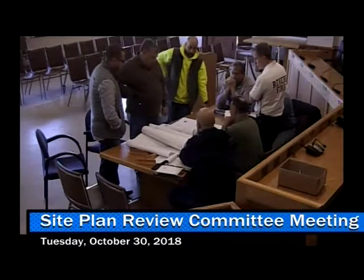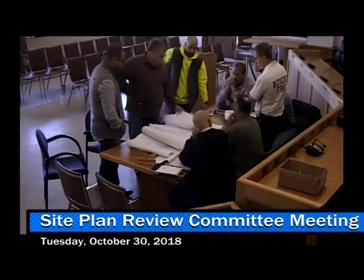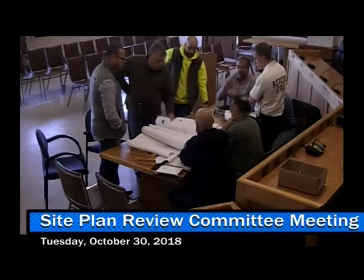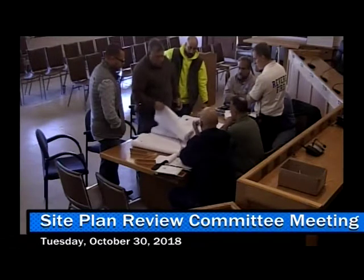Okay. All right. This has all been uploaded to e-permitting? No, it hasn't. I thought it was. Well, all right, so get that started, then we can get to issue a site plan review letter. You don't see any big problems? Nothing that stands out.